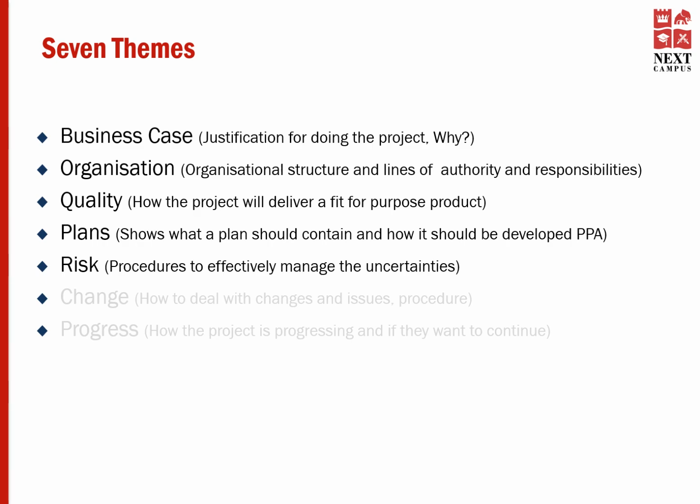Risk is an uncertain event or set of events that, if they should occur, would have a positive or negative effect on the project. The word threat is used to describe the negative risk. The word opportunity is used to describe a risk that would have a favorable impact on the project's objectives.